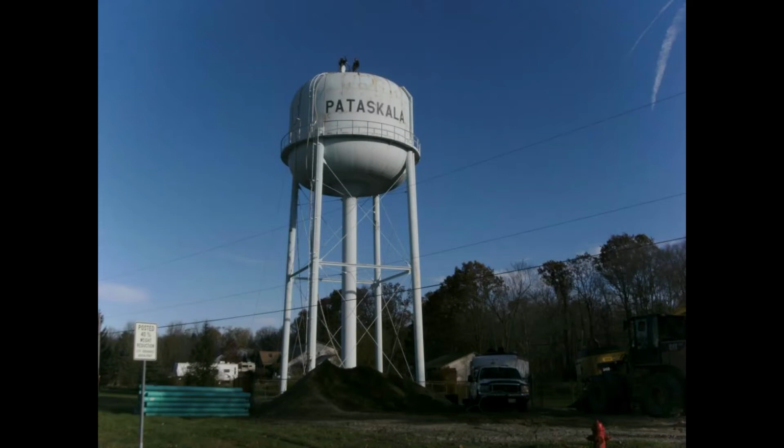And we're also doing some stuff that's going to help with infiltration, which will actually expand our capacity. Exactly. So actually, I'll tie in. I'm just going to jump up to number eight, which has no documents, but the inspection that happens on Wednesday with the EPA, they do them almost always annually. We haven't had one in a while because of COVID, so that's what this is. But one of the things she wants to talk about is the capacity issue. And that's where I'm going to tell her about the I&I program that we're going to do this year, trying to line the sewers, and hopefully that will give us some more capacity, because the I&I is our problem.